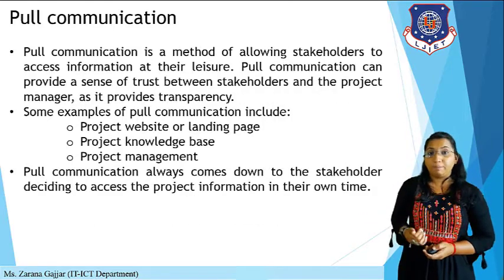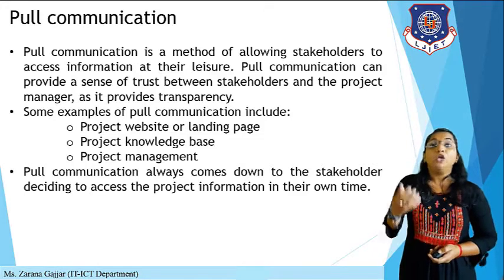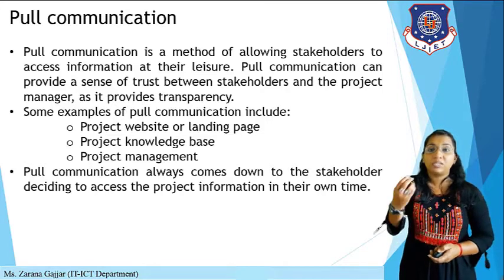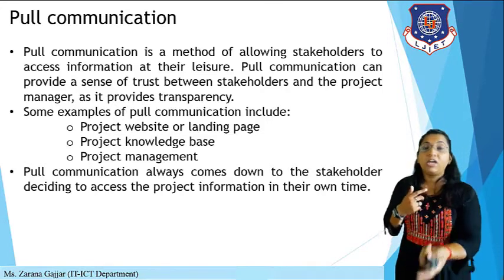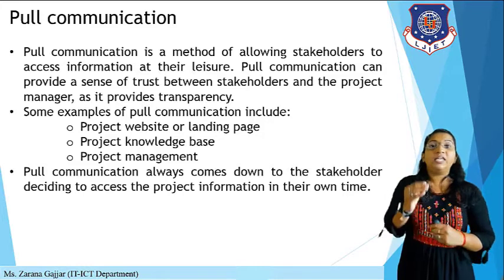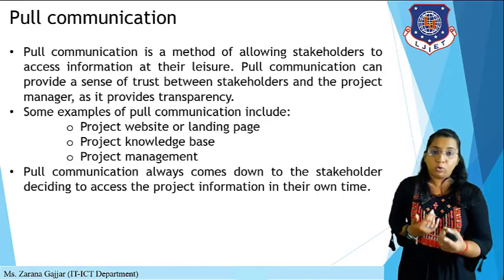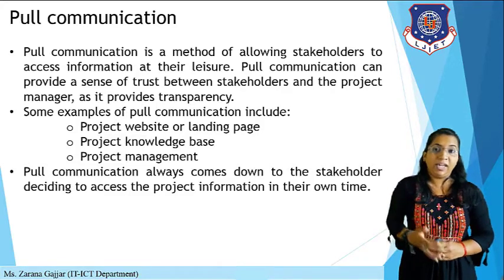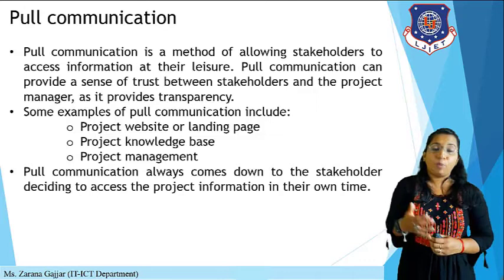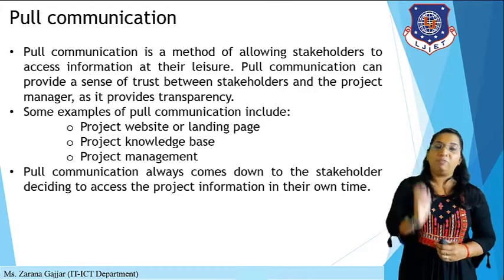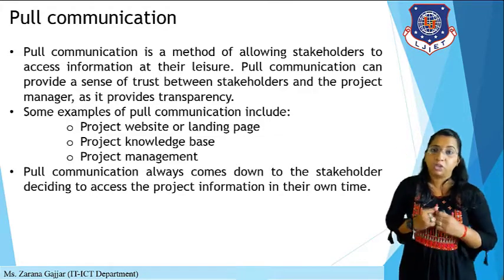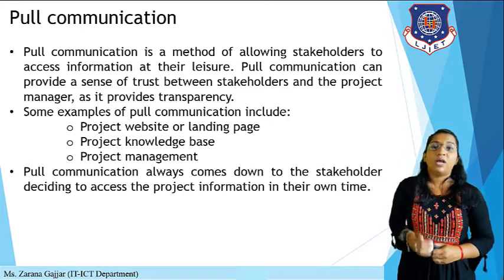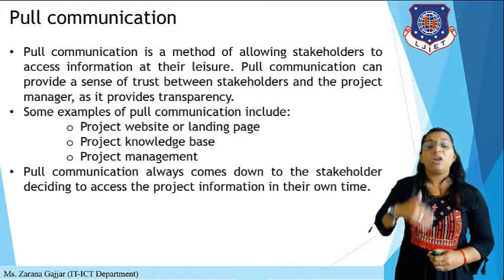So pull communication is a method of allowing stakeholders to access information at their leisure. Pull communication can provide a sense of trust between the stakeholder and the project manager, and it provides some transparency between those people. Examples of pull communication include a project website or landing page, a project knowledge base, and project management tools. If you are providing a website link, that will be pull communication. Pull communication always comes down to the stakeholder deciding to access project information in their own time.